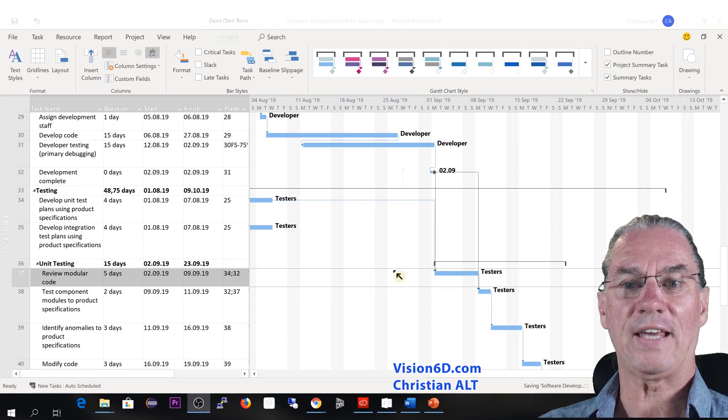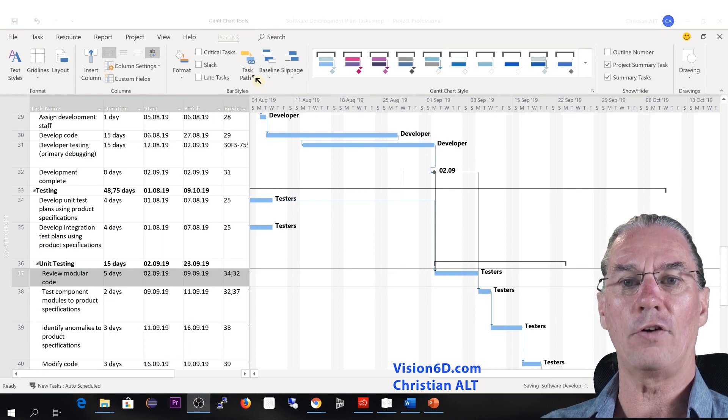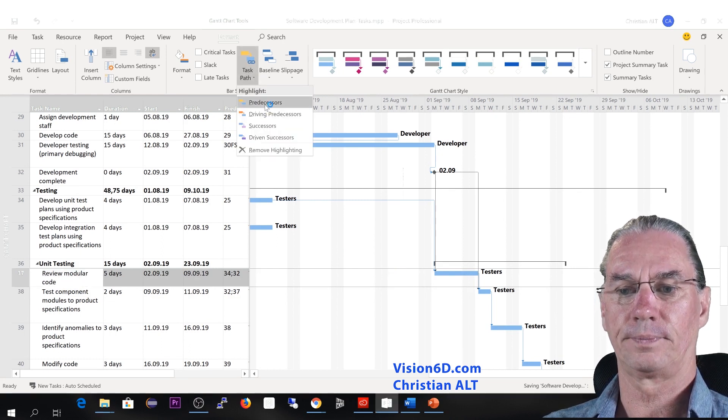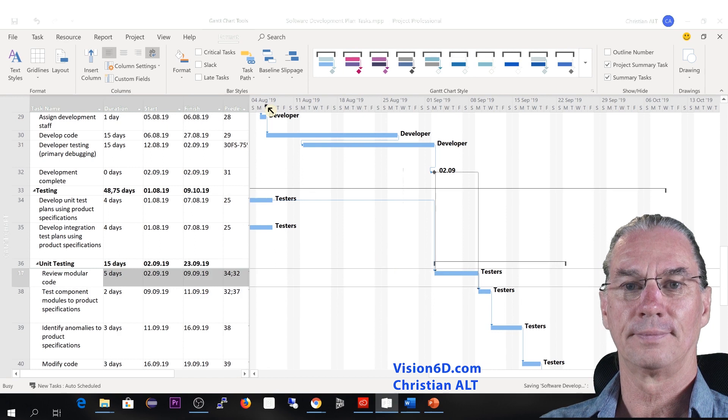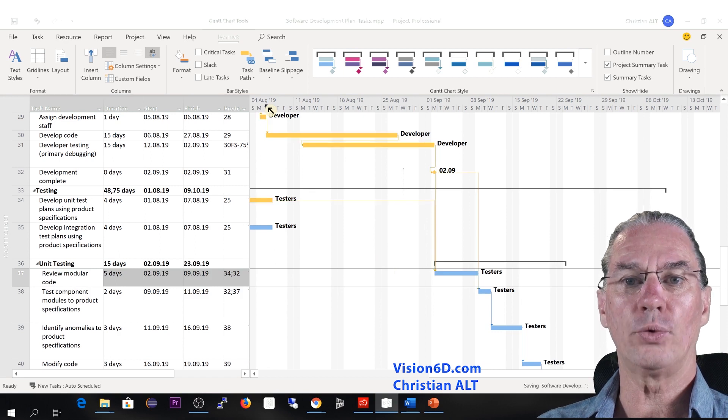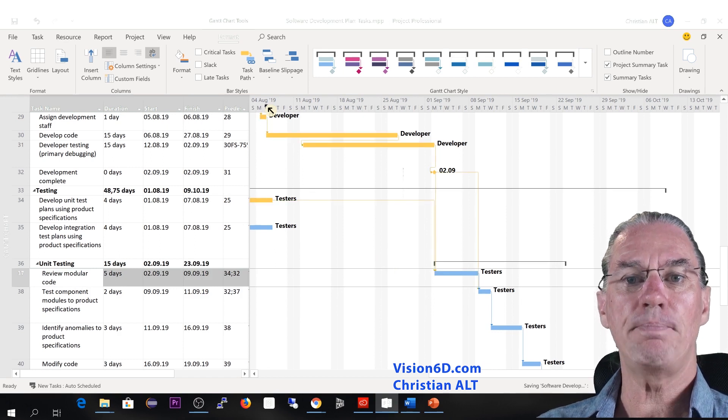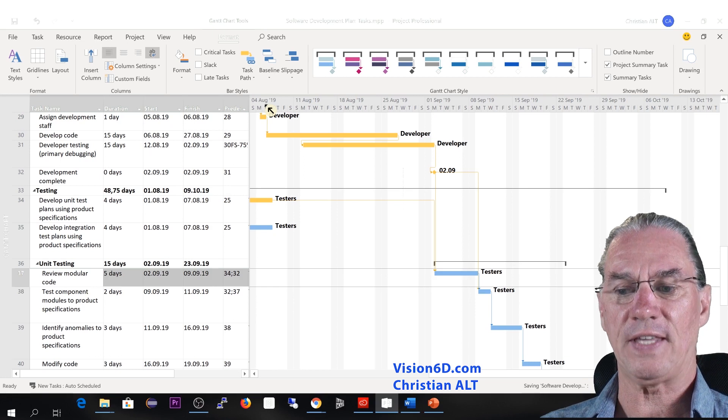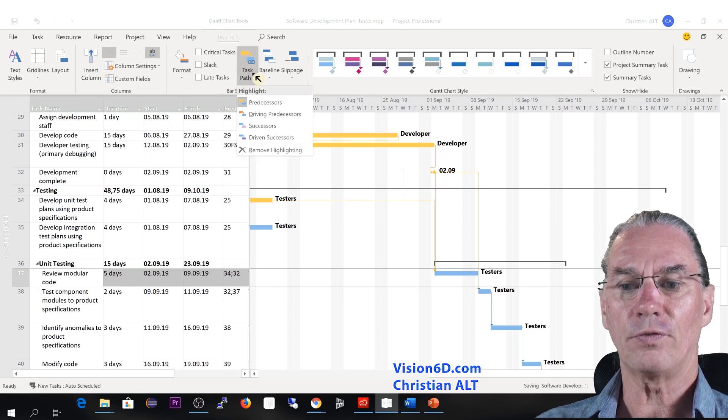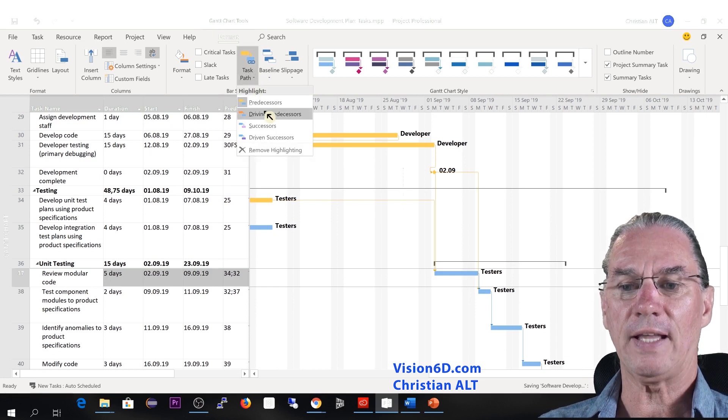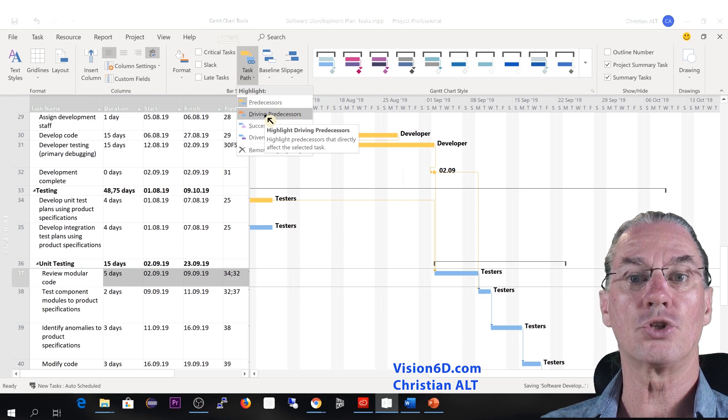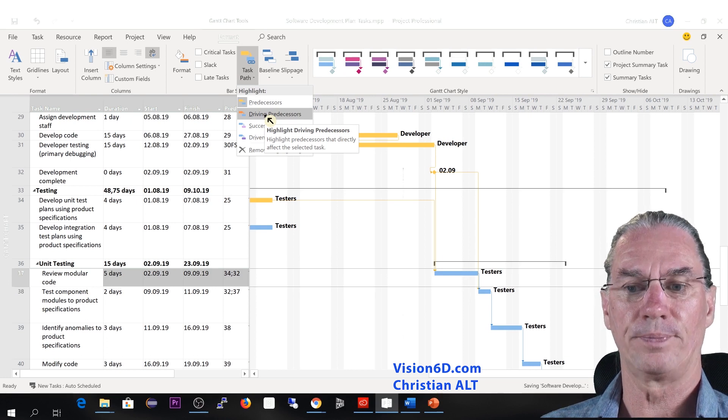A task can have a long chain of predecessors. But which ones are really directly impacting the schedule of this task? It's for this reason that we can here highlight the driving predecessors.